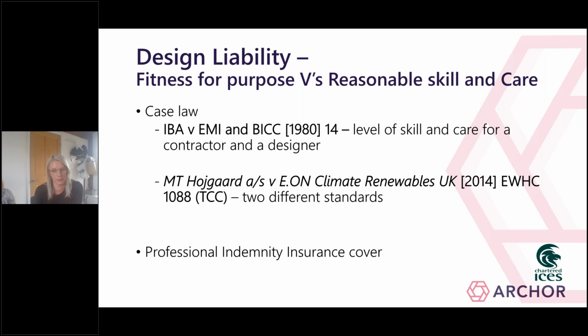So most professional indemnity policies have an express fitness for purpose exclusion, and signing up to a fitness for purpose obligation could mean not only that the fitness for purpose element isn't covered, but that the entirety of the policy is invalidated, which could obviously be disastrous.